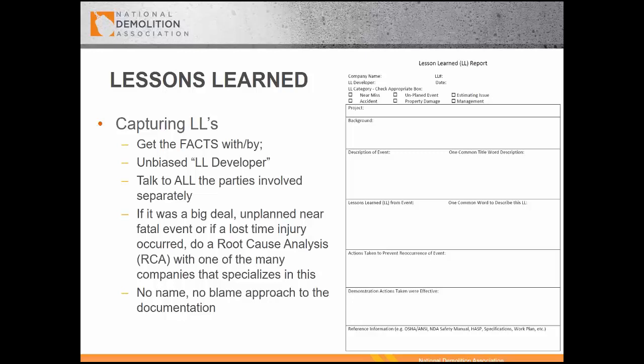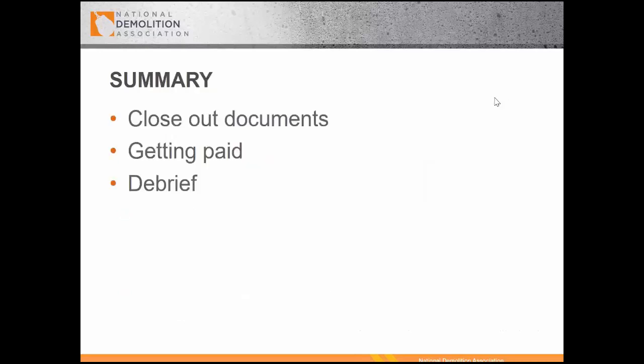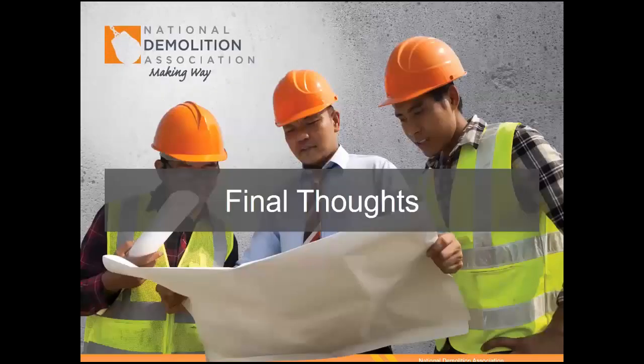And then that provides you the description of what happened, what you learned from the event, and what actions you can take to prevent a reoccurrence. And then after you've had lessons learned, and for some time, you can go back and see if they were effective. Next slide. Closeout documents, getting paid, and debrief. Next slide, Lindsay.